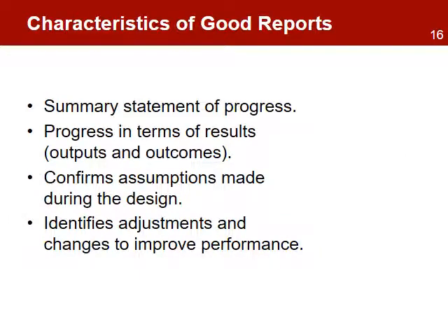What makes a good results-based report? Here are 4 elemental characteristics. It contains a summary statement of progress made during the reporting period. Progress is presented in results terms for both outcomes and outputs. It reflects actual results based on data collected over the reporting period. The report confirms if the original assumptions in the log frame are still valid, and if not, they need to be reformulated. Finally, the report indicates what adjustments, if any, are needed to keep the project on track to meet its intended goals.